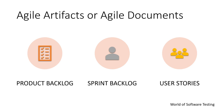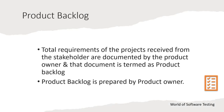Let's understand the first artifact: the product backlog. The product backlog is a visible, ordered list of everything we know we will need to do to deliver the product and what the team will work on next. The product owner is accountable for the content — meaning the requirements and the order of the items in the product backlog.